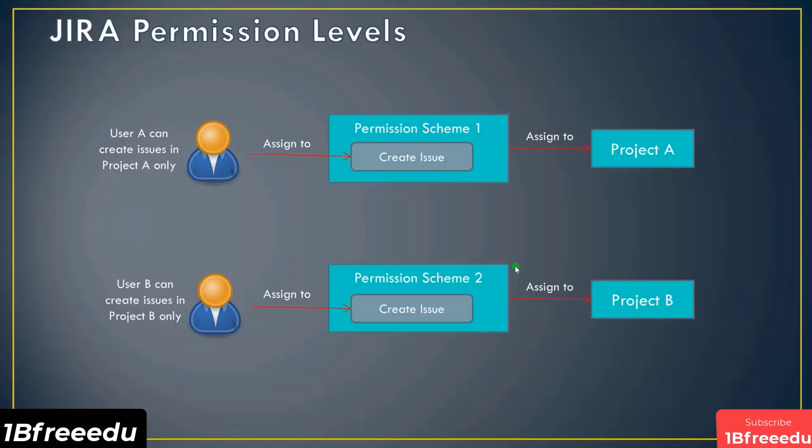And the way that works is you can define project roles across Jira. So it's kind of at the level of global permissions in the sense that it applies to all of Jira. So you can go in and configure project roles, and every single project that you create will have access to these roles. They'll basically end up having all these roles within every single project that you create. And then you can take users and assign them to the project roles. And instead of assigning the users to the permission actions, you would assign the project roles to the permission actions.